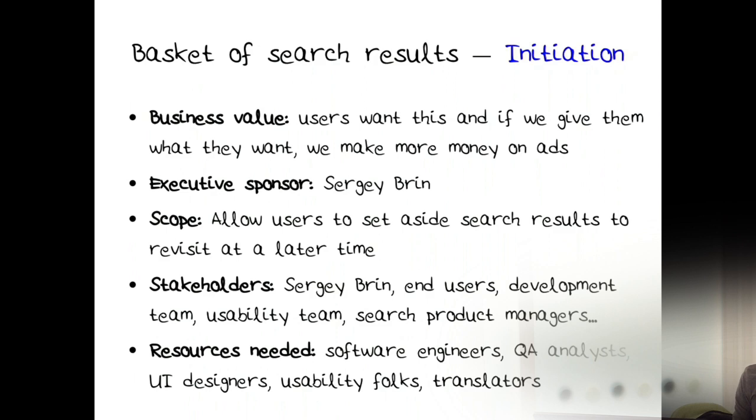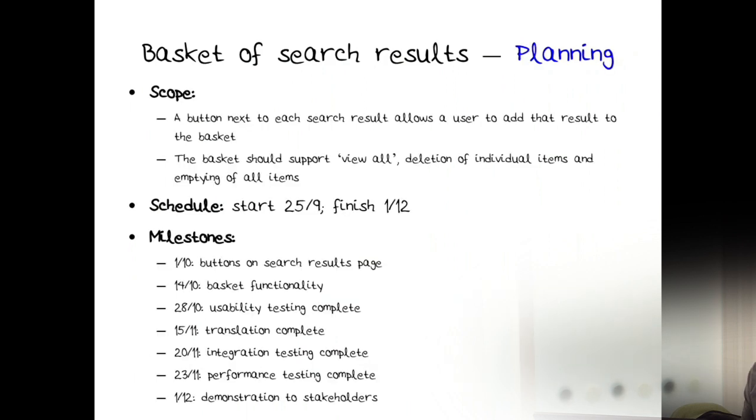So that was kind of initiation, and here's planning. So the scope: we put a button next to each search result that allows the user to add that result to a basket. This is a mock-up, right? And the basket should support viewing everything, deleting items, or emptying all the items in the basket. Schedule: we start on the 25th of November and we finish on December 1st.